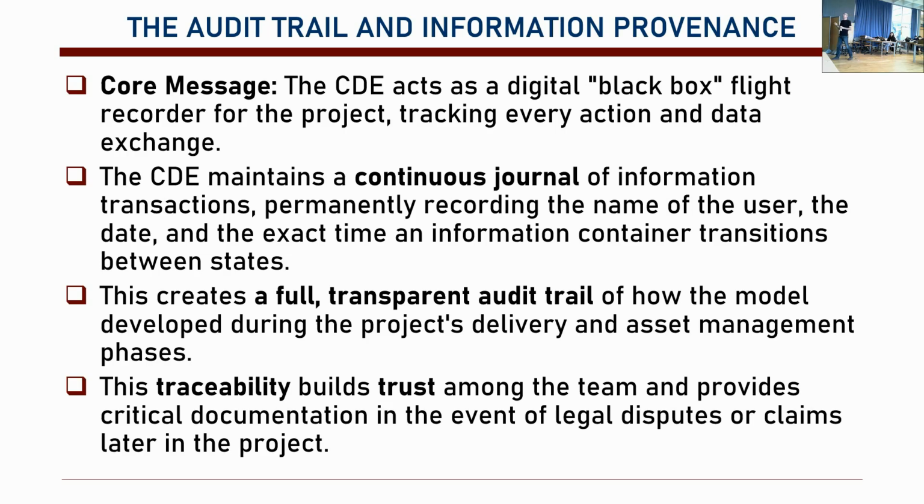For that purpose, we have a continuous journal of information transactions. Basically, we record the name of the user, the date, the exact time, and the information container transition. So when did they access that information? We can even see if the contractor has accessed that information.